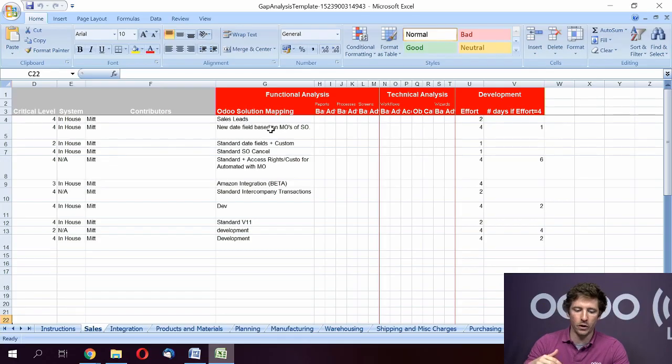Usually here again we work with a scale of 1 to 4. It depends on what you can expect of the amount of work. Is it a difficult aspect, because you know that you will have to look for an answer, you don't already have the answer, and that's something that isn't easy? Or is it something you know how to do, it's not done already, you will have to do the configuration, but you already know the way you will have to go to solve this issue? So this is something for you to give some weight to the development that you will do, and the amount of work it will represent in the end in the budgeting of this project.